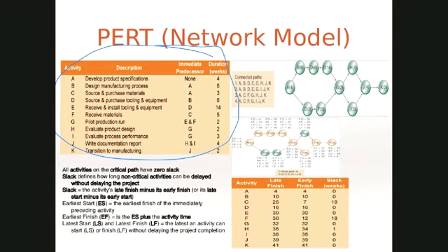All you do is create the sequence of things that define your process. As simple as that. Start at a higher level of abstraction, which is this is what it does, and then this is what it does, and then this is what it does. Then go into serious depth for each of them, till you find things where you know exactly where to implement a resource, where to schedule a resource, and also where to schedule costs and time.